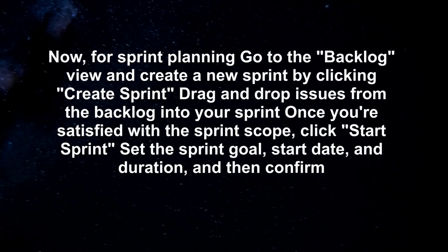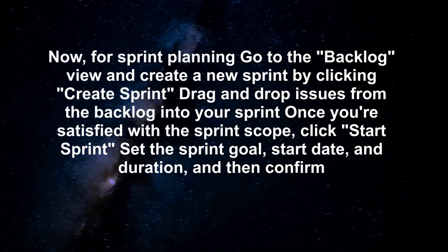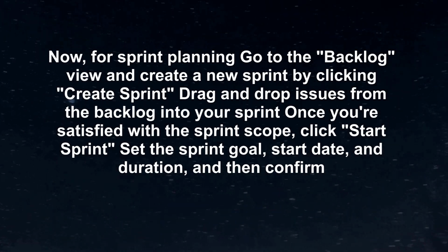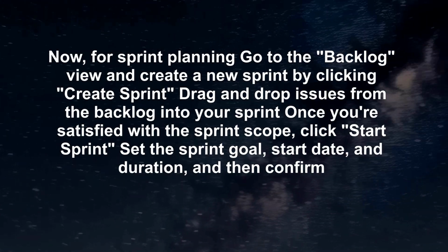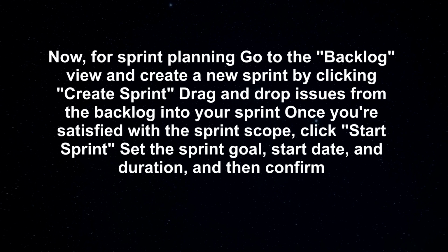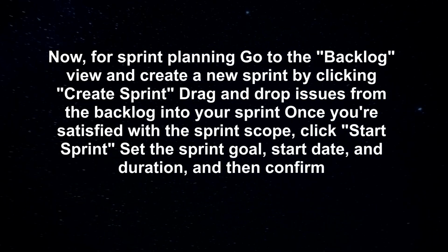Now, for sprint planning, go to the backlog view and create a new sprint by clicking Create Sprint. Drag and drop issues from the backlog into your sprint. Once you're satisfied with the sprint scope, click Start Sprint. Set the sprint goal, start date, and duration, and then confirm.